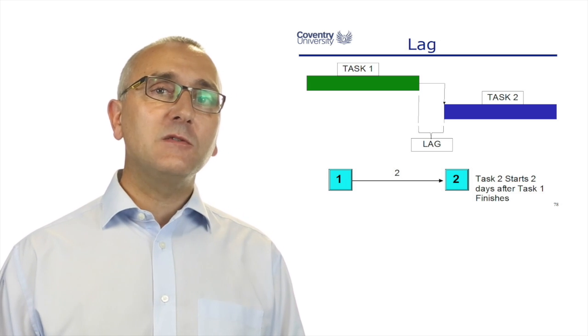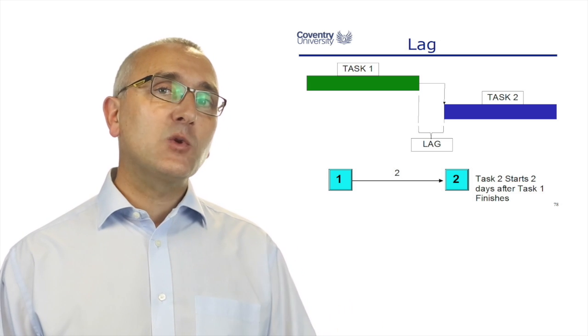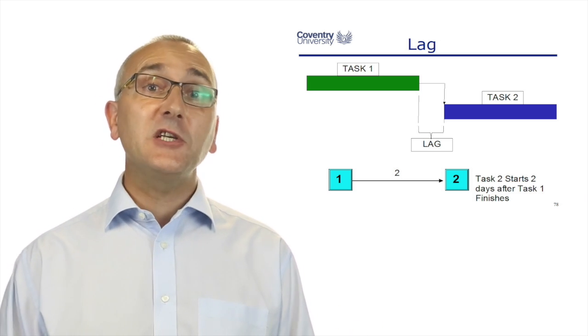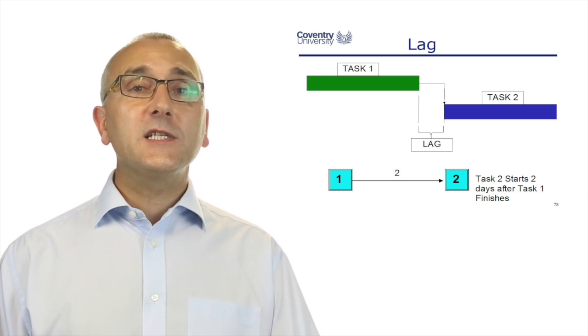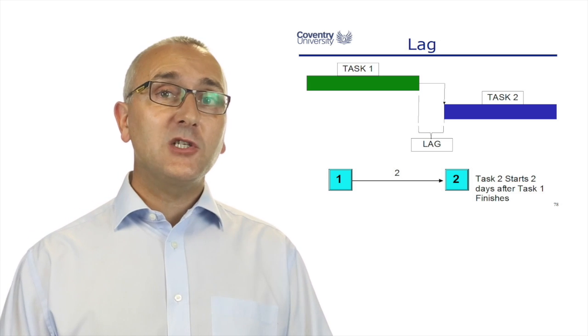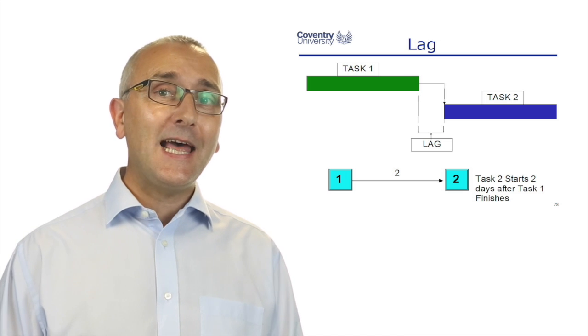It's a couple of examples of tasks that often have lags between them. Could be that task one is happening at a supplier and task two happens in house and you have to transport between them. Could be that task one is building a foundation and you have to wait for the cement to dry before task two you can build the wall. It's a delay.